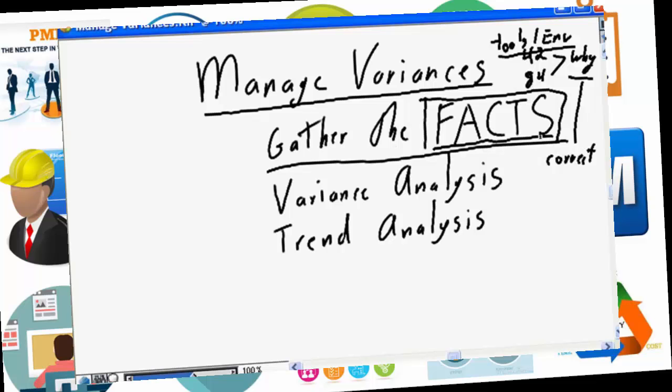We did an estimate, we thought it was 42, all of the tools, all of the environment are correct, but it's simply not enough. We are going to have to accept the fact that the project estimate, at least in this particular instance, was bad, and we need to understand that there will be instances where this happens, that there is no corrective action, and you simply accept the fact. Going forward, we are now 42 hours over on our budget, which means we're 42 hours worth of labor over on our budget. Leads us into the variance analysis.